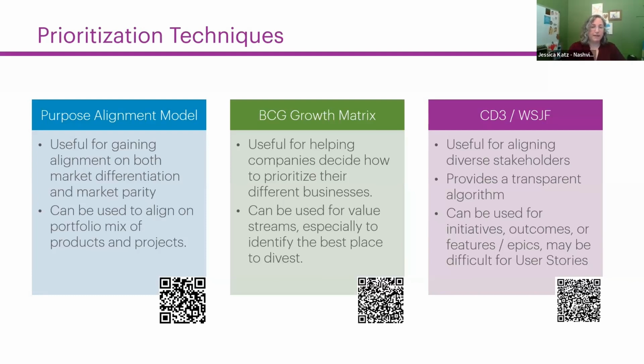It would take somebody really facilitating that conversation in a way that's helpful. I have used it before at the story level, and we dropped out things like risk retention and opportunity enablement, and we just went with perceived business value and time criticality as our top end of that. So you may have to alter it to achieve that at the user story level, but it can be done. It's just, it might be difficult. Does that help? Cool.